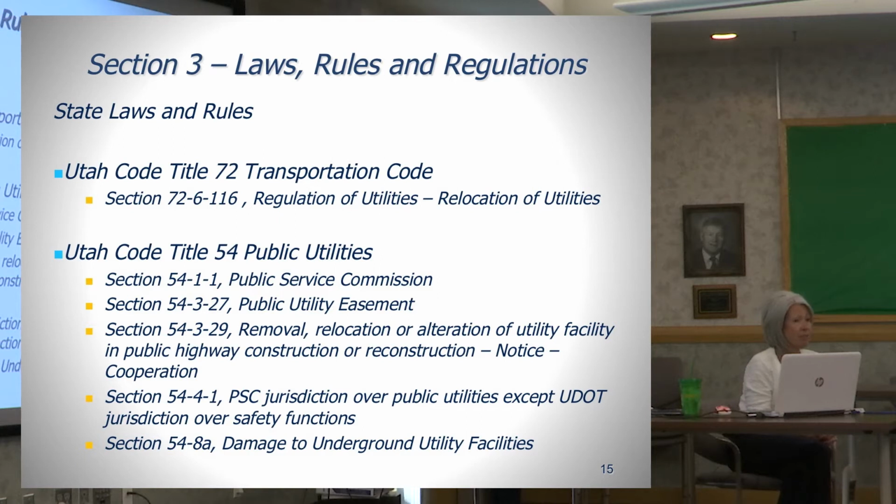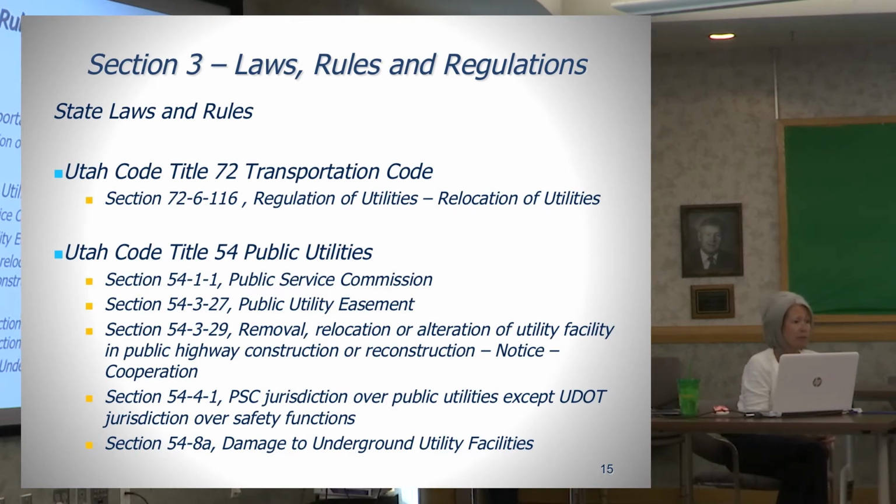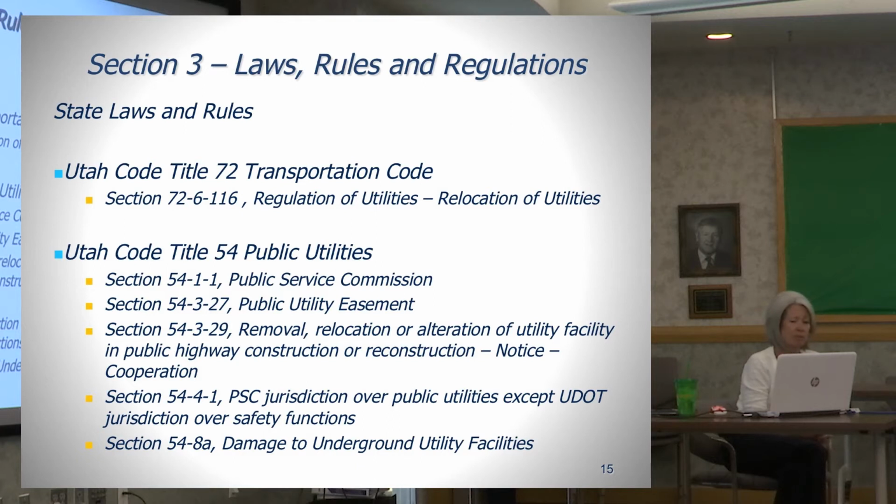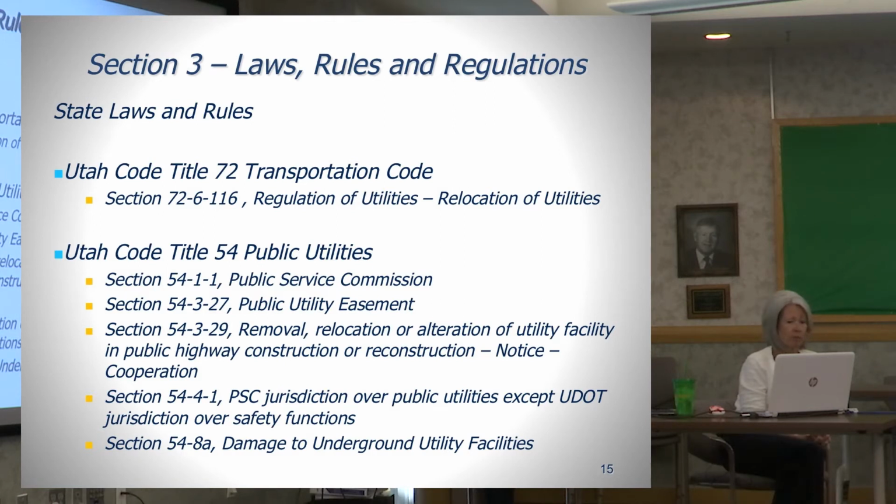It established a minimum expectation for utility companies being informed of upcoming projects, being informed if they were eligible for any reimbursement for their costs, and being allowed to participate in the design and planning process with a goal of minimizing utility relocations, minimizing future relocations, minimizing outages to their customers and a few other things. So it established an expectation on the part of the utility companies of how they're going to interact with agencies that are doing projects.